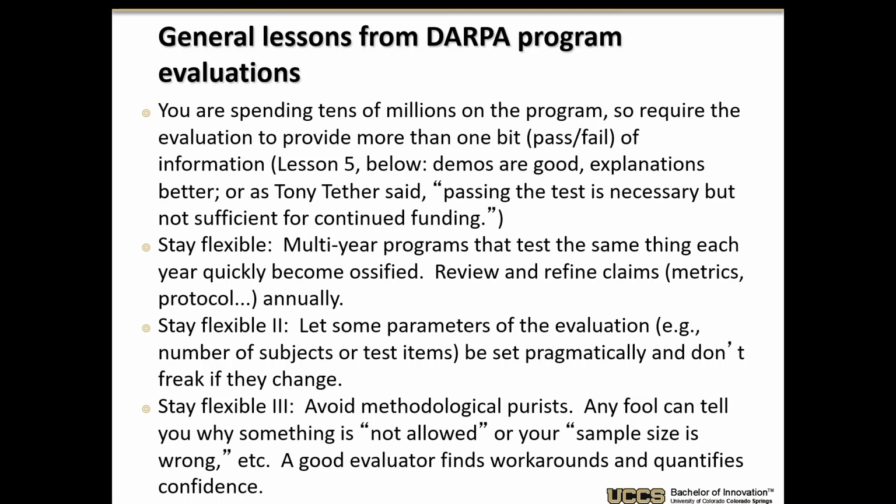You want to be flexible in the design. Multi-year programs that test the same thing each year quickly become ossified. They don't really answer the question. So you want to review and refine claims, metrics, and protocols annually and update them. As I mentioned, all the DARPA programs I was in changed their metrics along the way. There are some vague guidelines, but then they adjust them, sometimes making them much more difficult, other times a little simpler, and commonly changing the direction a little bit.